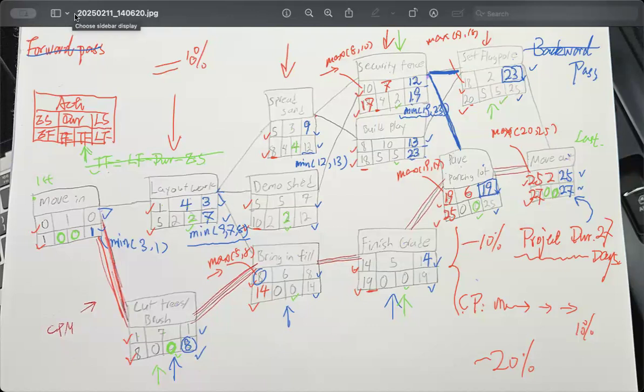If no question, I have a question really quickly. Go ahead. How do we find the answer for what the critical path is? Because I added the project duration statement, but I didn't know how to do the critical path one. The critical path is all the activities where TF is equal to FF is equal to 0.